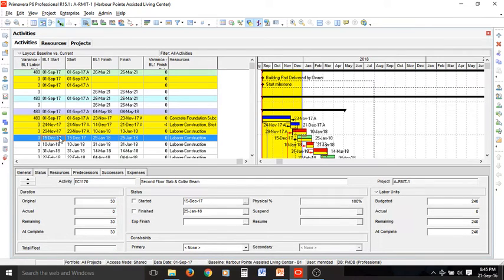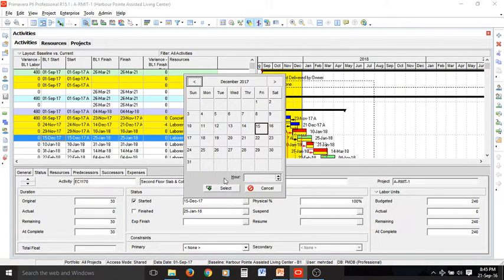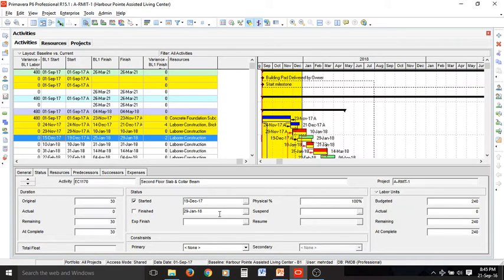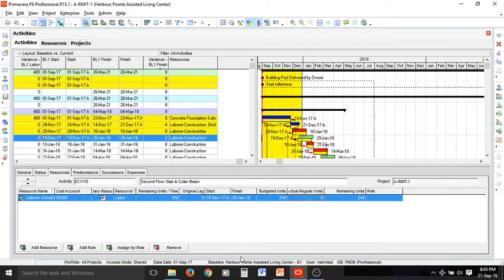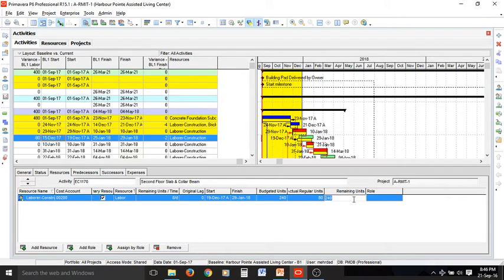The next activity is between the highlighted and non-highlighted zone — started but with some delay of about four or five days — and it hasn't been finished. You can go to the resources tab and update your resources. The laborer resource is 8 hours per day per unit and we have 240 of them. So far assume we have used 80 units, so the remaining units will be 240 minus 80, which is 160.